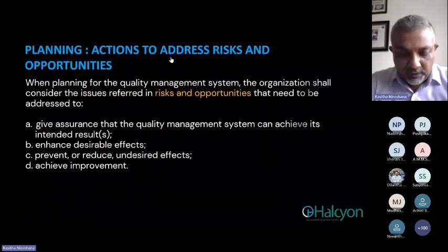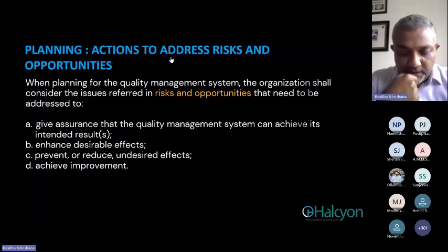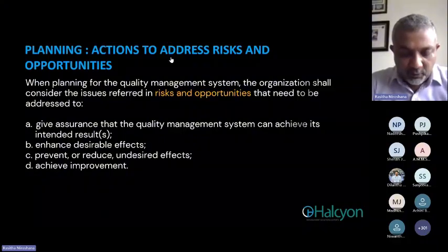The fifth month will focus on incident reporting improvement, implementing corrective action from past audit, and conducting an emergency response simulation to test readiness. Finally, in the sixth month, the effectiveness of the EHS program will be evaluated, with the compliance report prepared and new targets set for continuous improvement. This structured approach ensures regulatory compliance, workplace safety, and environmental sustainability at the power plant.